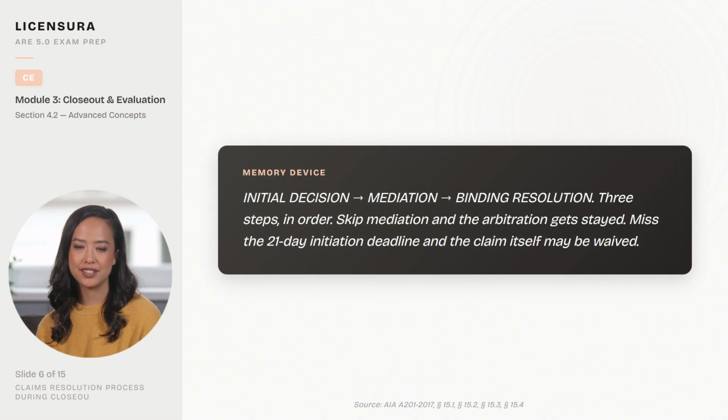Here's a memory device. Initial decision, mediation, binding resolution. 3 steps in order. Skip mediation and the arbitration gets stayed. Miss the 21-day initiation deadline and the claim itself may be waived.